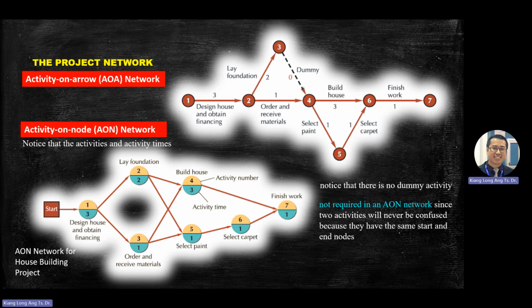So in AON, don't use dummy. In AON, I highlight here, you do not require dummy. Dummy only exists in AOA network. Okay. And if you can, don't do it like this. If you can, don't have crossing.